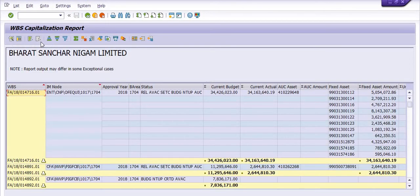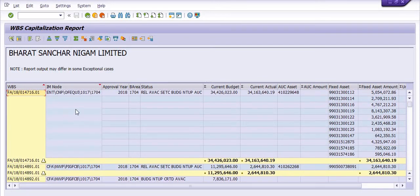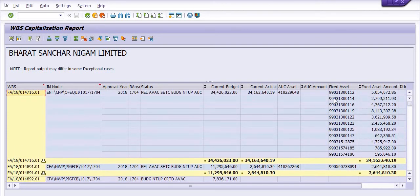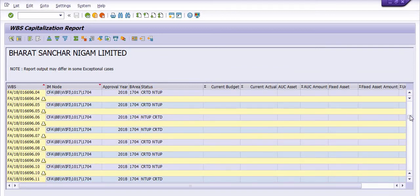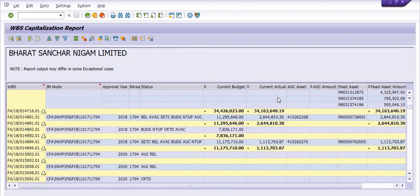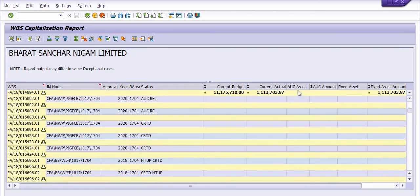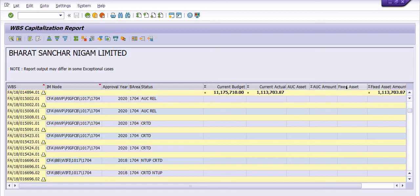System will generate the capitalization data for each and every WBS. This is IM node, this is approval here, this is the system status. These are the assets created with respect to these WBS. You can check all the data, the last stage of the WBS, capitalize or not, and all the AUC—asset under construction cost—should be capitalized in the WBS. This is our main objective.